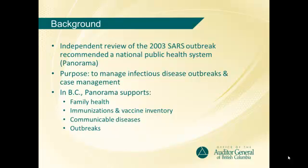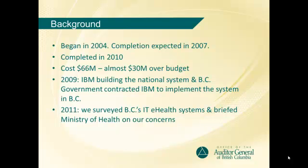The BC Ministry of Health led and managed the National Panorama project on behalf of all provinces and territories, while the provincial implementation focused on customizing and implementing modules specific to the needs of each province. In BC, Panorama supports public health functions such as family health, immunization, communicable disease management, and outbreak management. The Panorama initiative to build a system for all Canadian provinces and territories began in 2004, with expected completion by 2007. However, it was completed in 2010 at a cost of $66 million, almost $30 million over budget. In 2009, as IBM was building the national system, the BC government also contracted IBM to implement the system in BC. In early 2011, the Office of the Auditor General of BC surveyed a number of BC's eHealth IT systems to understand project progress and issues. One of these systems was Panorama.